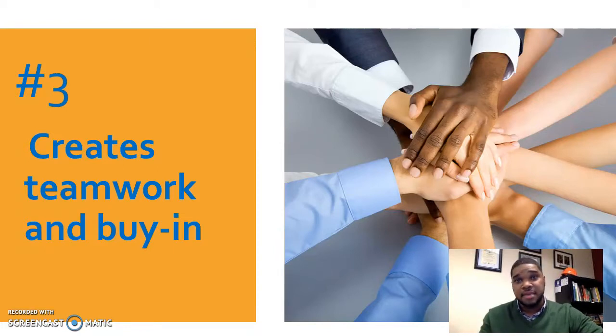I recently finished a mental health clinic here on campus. I work at a university here in the Midwest, and so we do all campus projects. And one of the things that I noticed when I was sitting down with a general contractor, one of the reasons for the delays, is we didn't have enough buy-in from the field personnel and the subcontractors. The general contractor had essentially put together a schedule and just told them, "Hey, here's when we need it done," and didn't really get enough buy-in to see, "Hey, you as the expert, tell me, can you complete this in a reasonable amount of time?" That is going to be very crucial to your team.